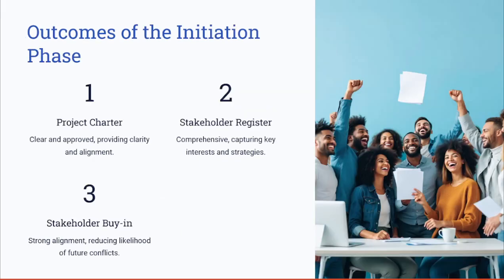What was the outcome of this initiation phase in this case study? The initiation phase concluded with the successful approval of the project charter and stakeholder register. These documents provided the clarity, alignment, and strong foundation for the planning phase. Stakeholder buy-in was secured, reducing the likelihood of conflicts in the later phases.